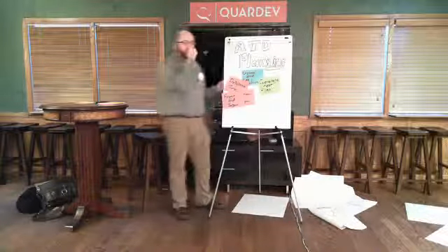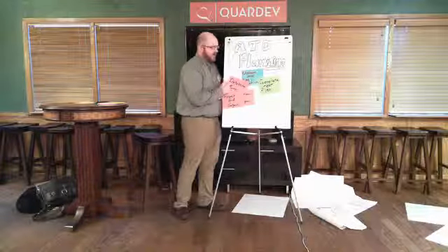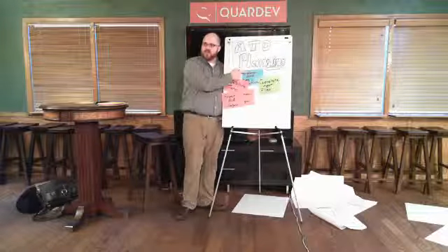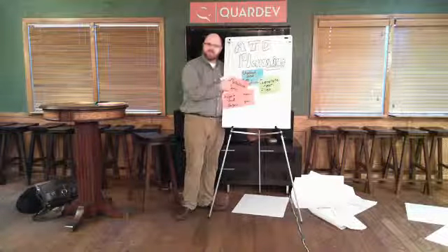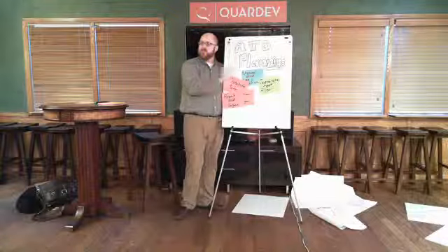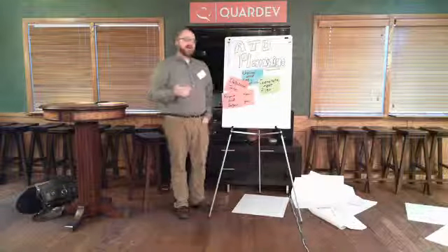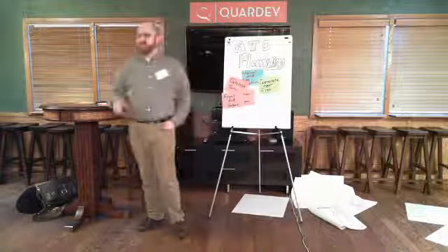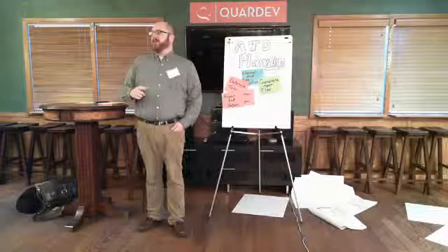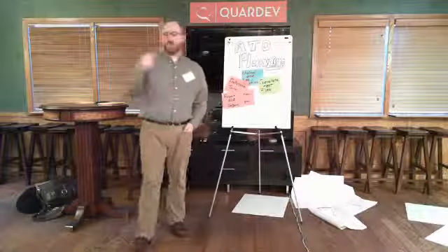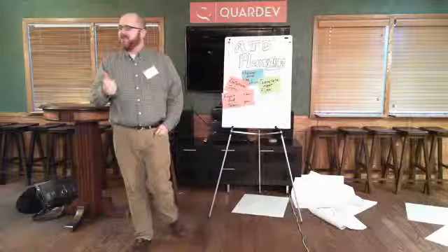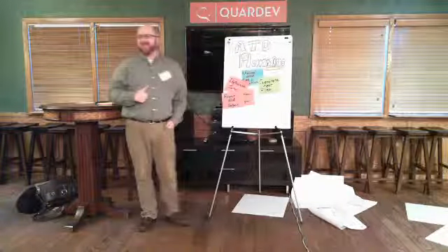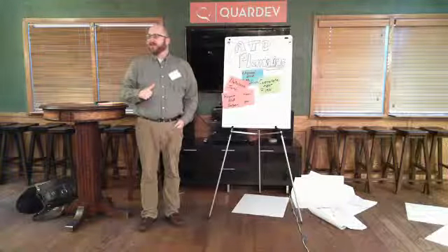So in a first habit, if you're just taking this on, we've got to create all the database tables. Are there any database tables you will neither read nor write to in the process of this test? Don't create them. Cut that stuff out. Move that on to a different test. It gets really exciting then, as you continue this, to say, well, what test will handle those? There wasn't one. Oh. Maybe we should not build that feature because we don't care about it, or that's a change we forgot to tell you about that you'll also need to test. Grab a sticky note and get that written down.